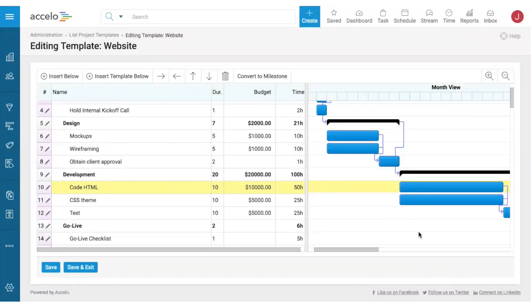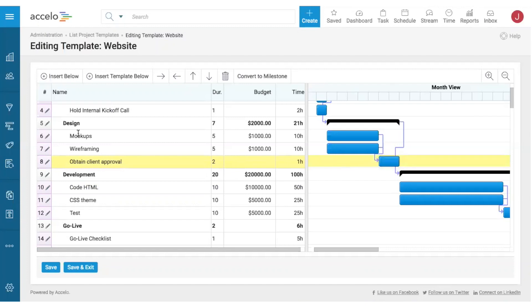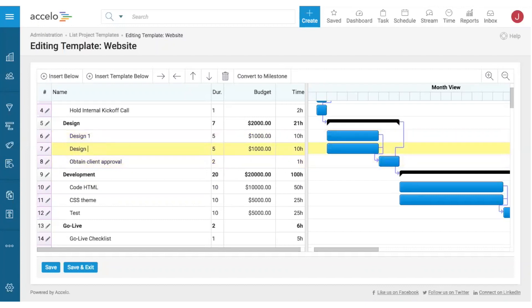The other important part of templates is the choice between task-based and resource-based approaches. Most templates default to task-based: you define what needs to be done — mock up the design, wireframe the design, get client approval. A resource-based approach instead puts 'Design Resource 1' and 'Design Resource 2' as the items, treating them as the people who need to work rather than discrete tasks.